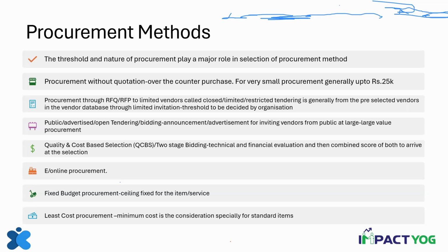So again, it will depend on the kind of method. It's a two-stage procurement method. Then with the technical committee of the procurement committee, we will only share the technical bids for their evaluation, because once they have done the technical evaluation of those bids, then only those candidates which have crossed the technical threshold, we will take them to the financial bid and share the financial bid only of those vendors who have qualified in the technical evaluation. So remember, that's how it is.